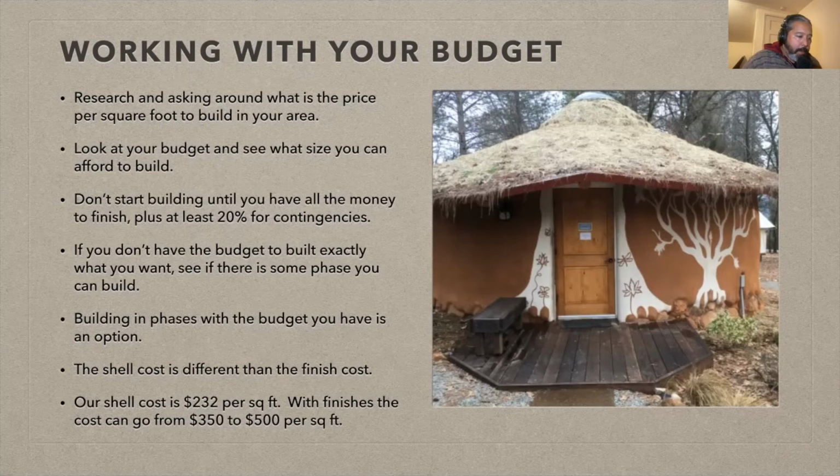So we're building in phases. The shell cost is different than the finished cost. So if you're asking a builder, make sure you be really clear. You want the finished cost estimate, not the shell cost. We always give our clients the shell cost because I can't tell you what the finished cost is going to be, because I can't tell you what windows you're going to choose or what roofing style you're going to choose or what countertops or what lights or what fixtures you're going to choose, what floor, what granite, tile, toilets.